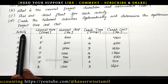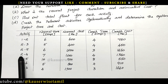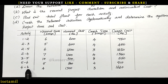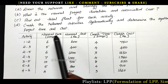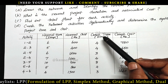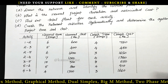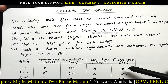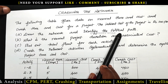And the last one: crash the relevant activities systematically and determine the optimum project time and cost. The activities given in the problem are: activity 1 to 2, 2 to 3, 2 to 5, 2 to 4, 3 to 5, 5 to 6 and 4 to 6. These are the various activities with normal time in days, normal cost in rupees, crash time in days and crash cost in rupees. Now we are going to do each and every calculation separately. Let's see the first one: drawing the network and identifying the critical path.